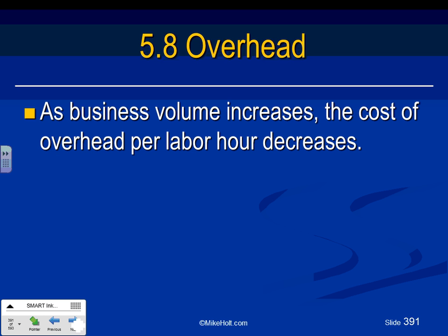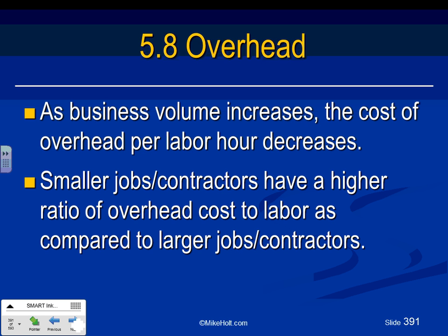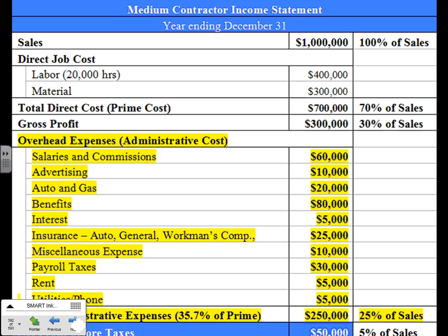Overhead, business volume. If you have a bigger company, guys, your overhead is typically lower per project because you can use the fax for all the projects and electricity for tons of projects. If you're a smaller company, your overhead will be a little bit higher per project, because you use a fax machine for one job versus using a fax machine for 15 jobs. So that's just a few things about the jobs.